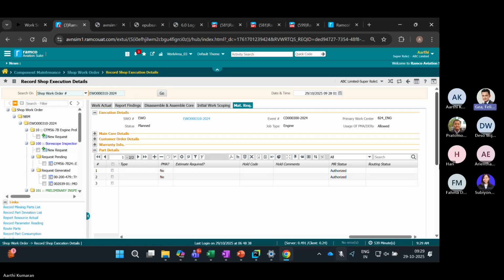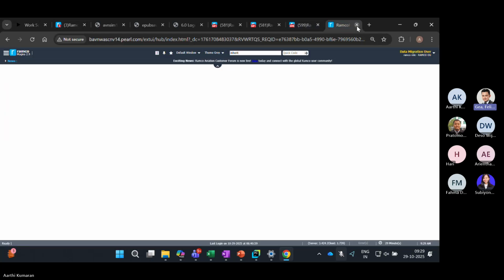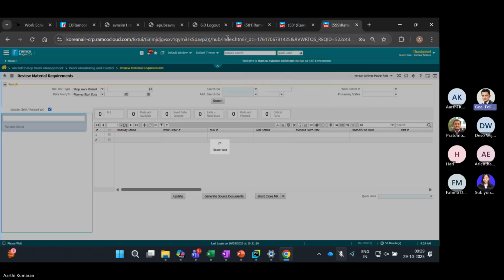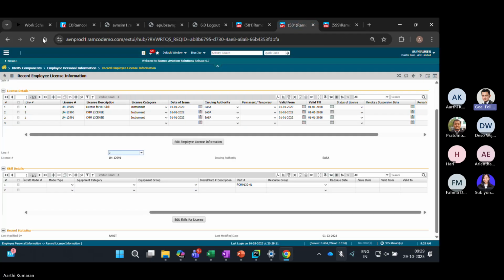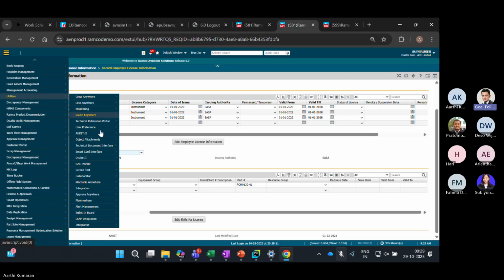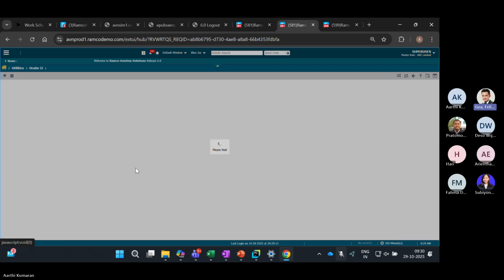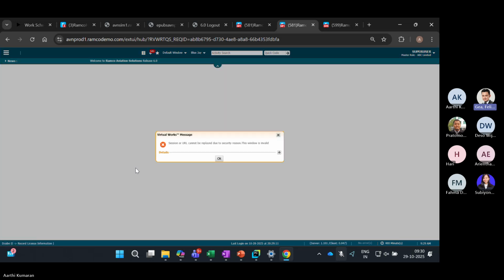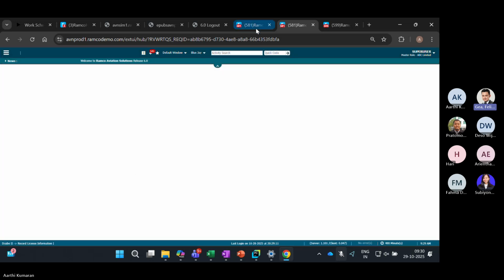The next thing, if you really want to see what is happening: the first question is, do you have it or not? The next question is, will it make it? Has that particular process been done, and has procurement taken steps so that the expected receiving date matches with your needed date? That's the next question. That's where you can see it.